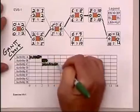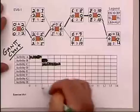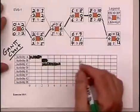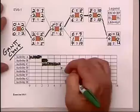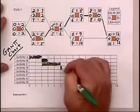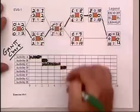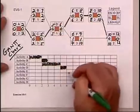Then D can start as soon as B and C are completed, which is the fifth day, and it takes one day. Then we can start both E and F.